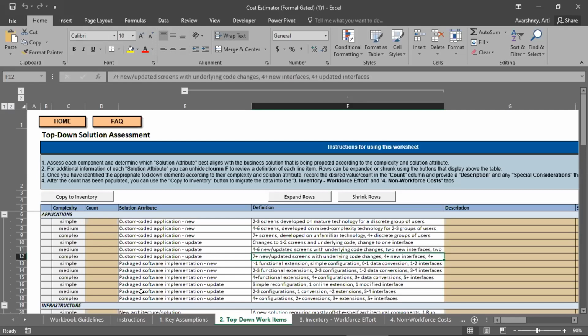How much of that effort is going to be required? It is a pre-calculated field that comes out of the reference data that we have already used. It is already built into the tool. So this is where you are going to break down your entire design, the possible design. You're not sure of it, we know that, but the possible design and possible development activity will be split into the number of work items, and you are going to enter the data here.